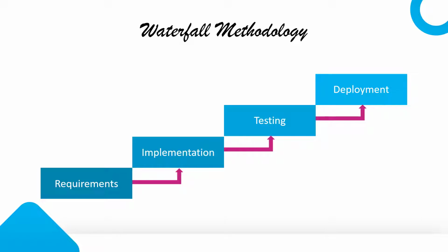But what happened in waterfall methodology is, if you have a big project, initially all the requirements were gathered together, only after that implementation started, and after all the implementation is done, then testing was done on the complete project, and finally there was a deployment of the complete project. That is great, but with that we had many issues.